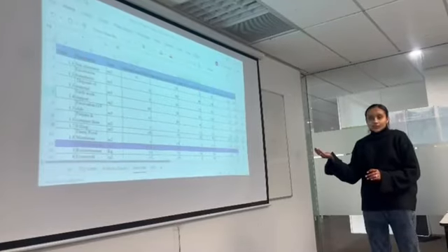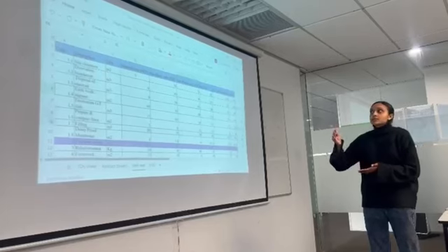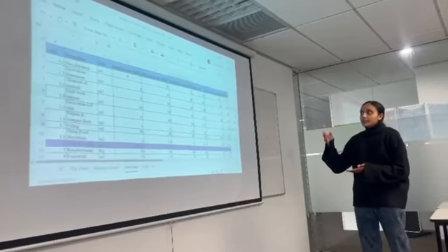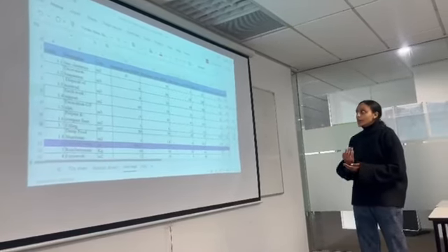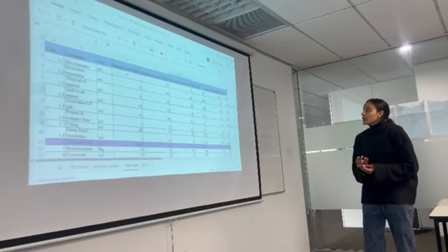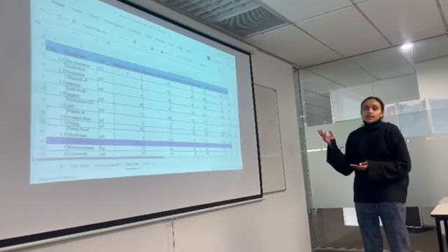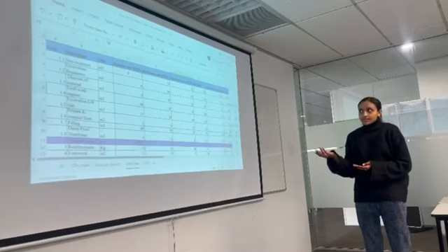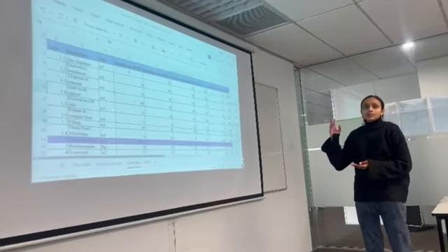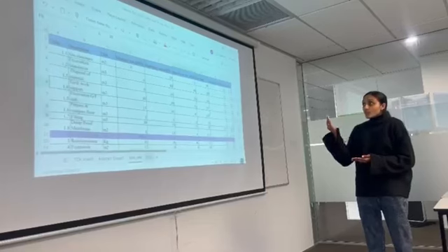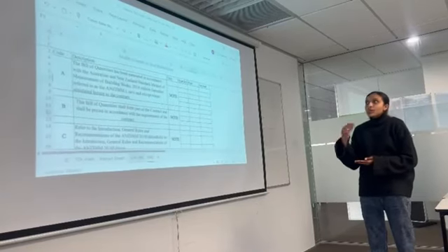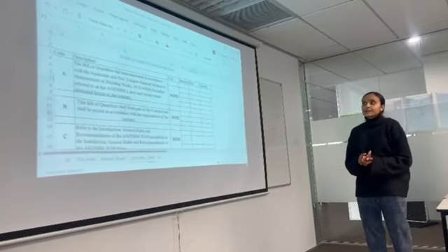Here is my unit rate, in which the description, unit and different material cost, machinery cost, manpower cost, and also the overhead and profit are included, that I am getting from websites. I am using lots of websites for calculating the data. And next is my SOQ, the schedule of quantities for a small building project.